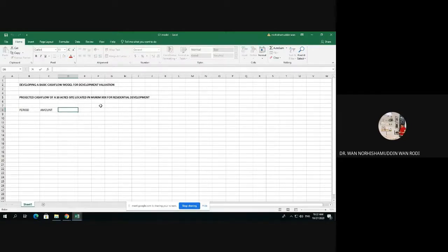Since we are conducting development valuation, you must start your cash flow with period 1. So these are the quarter period 1. Let's say our development period is 2 years. Therefore, our quarter would be 8 periods. Okay, you type in 1, 2, 3, and then you could drag until quarter 8.